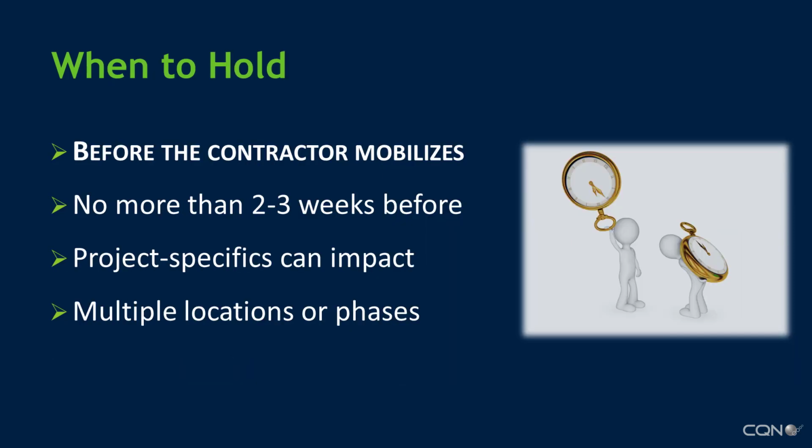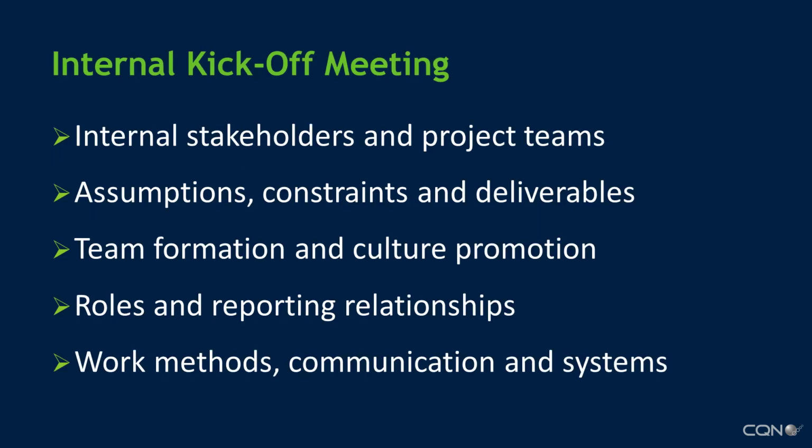When to hold the kickoff meeting. On high-risk sites, the meeting is best held shortly before the contractor mobilizes to the site, generally no longer than 2 or 3 weeks. Many project specifics can alter the timeline, but recency bias is good in this case. Projects with multiple locations or phases typically require individual meetings to deal with each set of specifics.